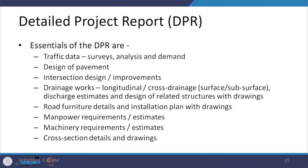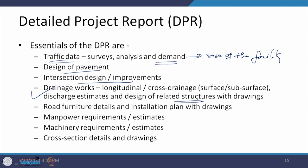The DPR also includes traffic data, which culminates into demand and then the size of the facility; design of pavement; intersection designs and improvements; drainage works in the longitudinal and transverse directions; specific structures — their type, design, and drawings for field construction; road furniture details; installation plans with drawings; estimates of manpower and machinery requirements; and cross-sectional details and drawings that give earthwork computations.